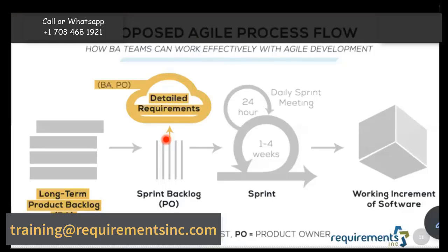Now you get into this idea of, okay, overall, based on the user story, the title, and the acceptance criteria, how many days will this item take? You're not getting into the nitty-gritty of the hours, but as a team, can we all agree, okay, this is probably a 3-day item. This is probably a 5-day item, correct? To that extent, you can get the team's agreement.